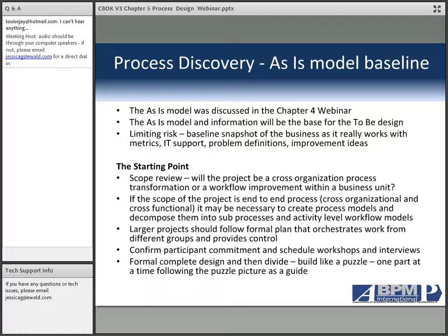And in a lot of organizations, when a project is first conceived, there's an estimate that's pulled out of the sky, and you have to live with that estimate. The problem is that it makes things very difficult to essentially achieve. So we suggest that at this point in time, once you understand what the project is really going to be moving forward, that you take another look at that estimate, and that estimate now becomes adjusted based on the types of technologies that you think you're going to want to use, the timing of those technologies, the types of changes that you're going to be involved in.